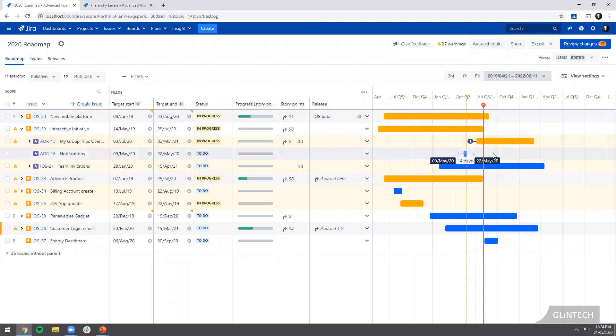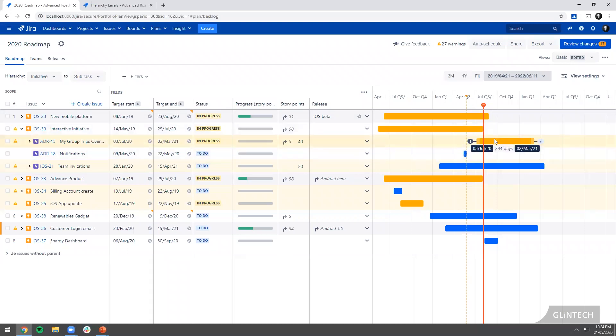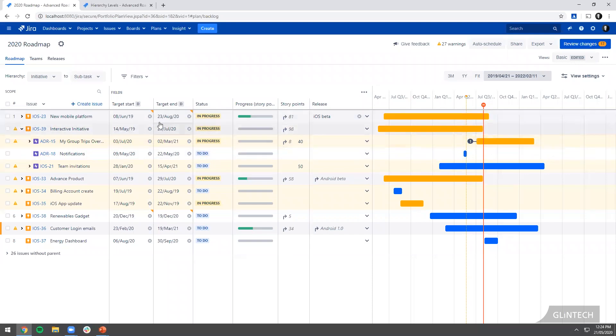Incidentally, if you make changes within Portfolio, it won't let you do this. It will actually make the parent extend out beyond that. If somebody changes it natively in the JIRA project, it's going to just point out that's a problem for you.